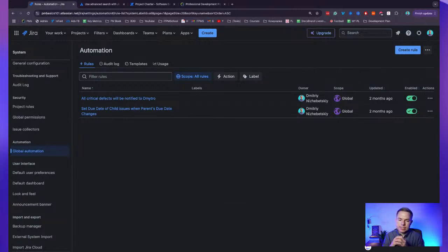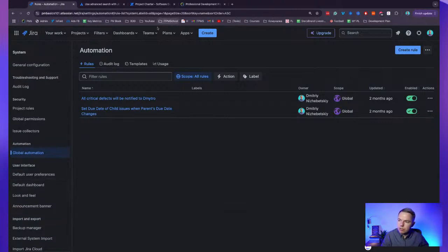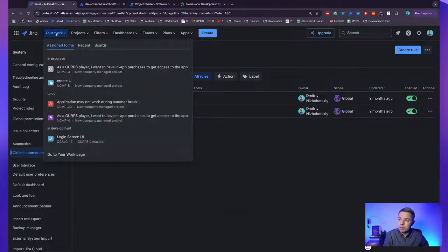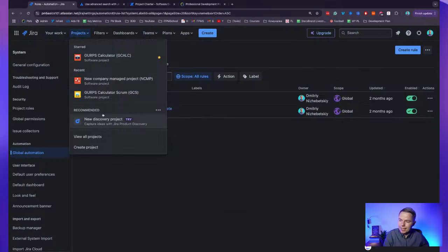I capture the date and time of that event, and when someone sets the status to done, I also capture it as an end date. And in the long run, I can export this data through additional plugins, but I have real data, real duration for each and every task in that project. I had to do this in this example specifically because the team was not educated and didn't have the culture of capturing the effort spent. So I had to automate it for them so that they are not distracted. I don't need to overcome lots of resistance and stuff like that.